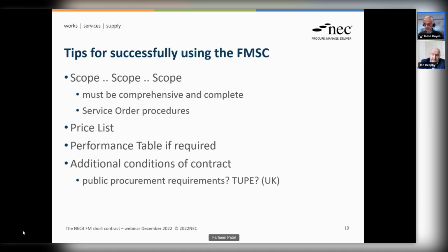And it's just making sure that they're written in the right sort of way, in the right sort of language, preferably without any future tense clauses in it, that somebody has actually stepped back and thought, how do we make these work within an NEC approach rather than just lifting something they've used for the last 10 or 15 years and not thought about. But you will have to have them sometimes in those contracts. And if you're going to start changing anything more significant, you need to think about how you're reallocating risk. And so will, of course, the service provider, because the client will pay for it somewhere. It's just how you're allocating that risk.